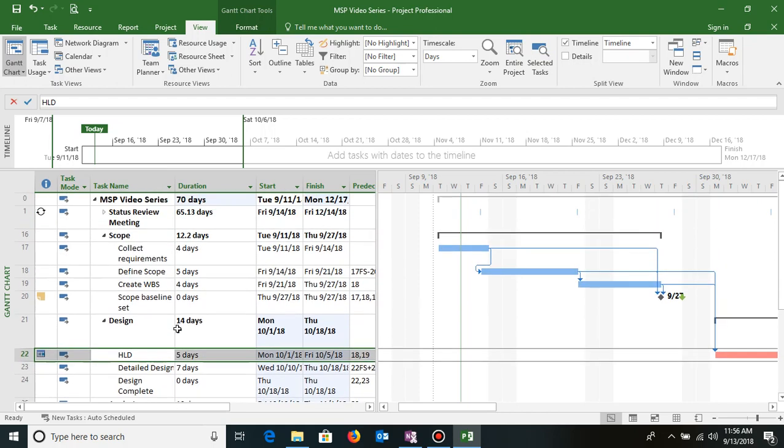And we also talked about deadlines. Make sure you have deadlines associated with your important milestones, and if there are any constraints, you do attach those constraints as well. Make sure you attach note items whenever you are attaching constraints and deadlines to your activities or tasks. So that's it for this topic.